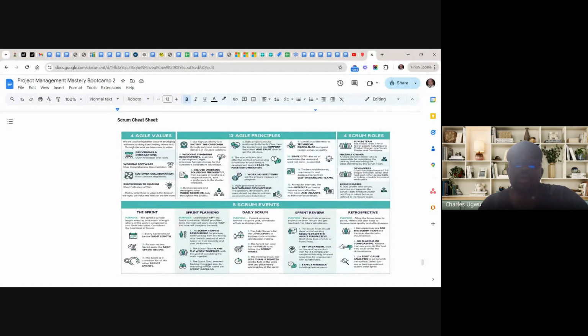The sprint goal, the selected product backlog items, and the plan for delivering them is what we call the sprint backlog. So everything is planned together, both the goal and the items we selected and how to deliver them, is what we call the sprint backlog.